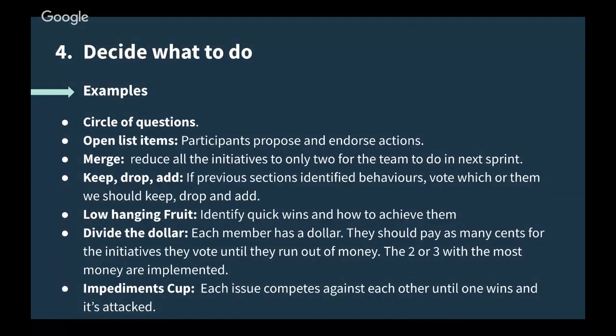And you eliminate most of them by having to choose between only 2. So if you get 8, you divide them in pairs, and they compete one against the other until you only have 1 or maybe 2 in the final, and those are the ones you attack.